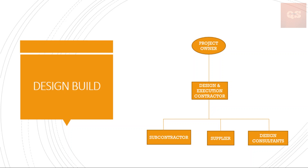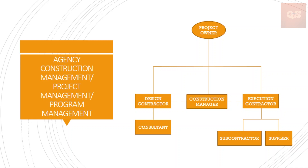The next arrangement is called the Agency Construction Management arrangement, also called project management or program management contracting. Here, the owner still maintains a direct contractual relationship with both the design professional and the execution contractor, but will also have a contract with an independent construction manager who coordinates between the two entities — the design contractor and the execution contractor — and oversees the activities of both. The construction manager is granted some authority as a limited agent of the owner, meaning they can take certain contractual actions in the owner's name and the owner will be bound by such actions, while some critical actions remain exclusively reserved to the owner.